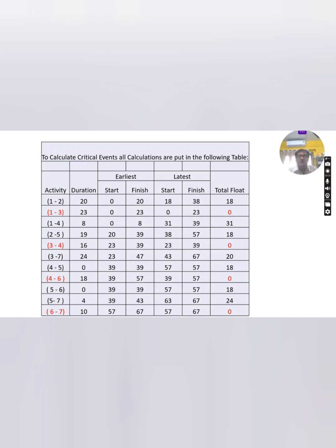Now this is a dummy activity, so no subtraction; it is 18 days. The latest finish time 57 and the earliest start time 39 gives 18, and 18 minus the duration of the activity 18 is equal to 0. See for this, the latest finish time 67 minus the earliest start time 39 minus 4 will be 24. In this way you can compute the total float.